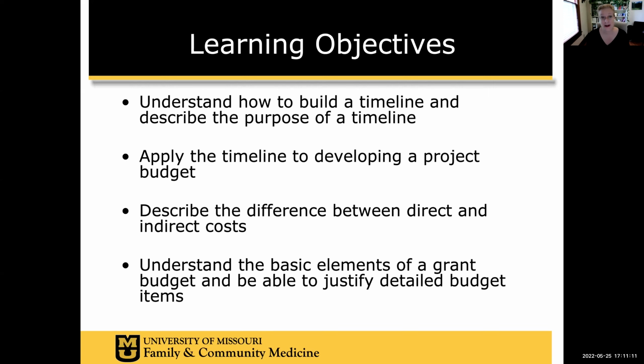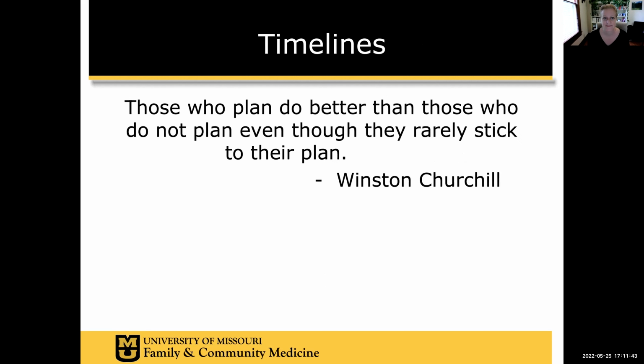And I know a fair few, both new and experienced investigators are like, I did not account for that. And a really good example of that, most people fail to account for patient and partner participation compensation. So you said you're doing an engaged grant, but you have no money for it. People are like, well, are they really? Because you're supposed to compensate your patient partners. So we'll get into all those sorts of details and find out all the fun stuff that goes into budgets.